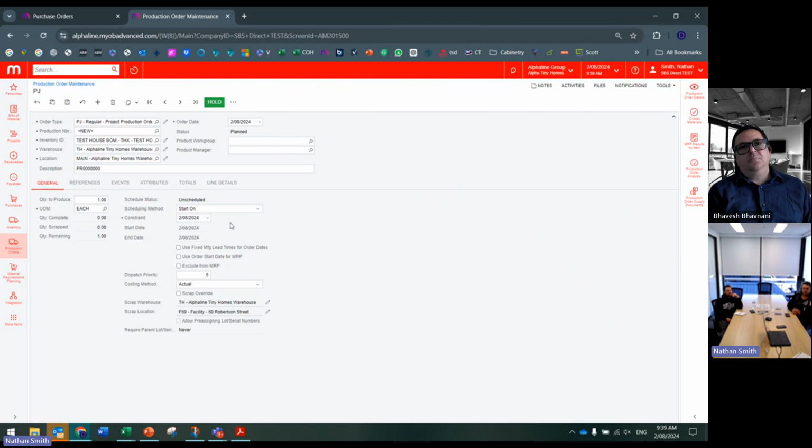It's not. When we run the MRP, we're just going to have a lot of late items that we'll know about, and we'll just need to manage. Yeah, that's fine. I understand how the system works. I'm just going to tell you how the system works. You can manage the dates based on, like you said, if the second operation takes 6 weeks, we are not going to finish the first operation and just wait there 2 to 3 weeks. So you may want to start the production later on. That's all. Gotcha. Unless obviously you have material on hand already for the second operation, then you can start.